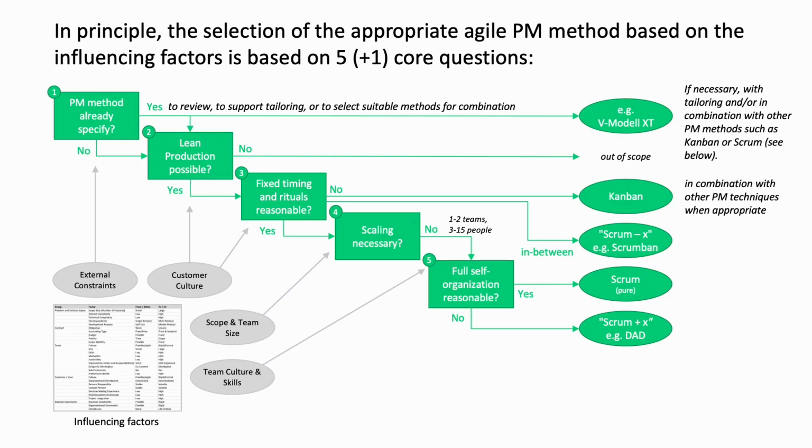And so, back to the selection process, it is to be added here first of all still that independently of whether pure Scrum or a variant with somewhat more organization is used, individual Kanban elements are often combined, in particular Kanban cards and the Kanban board. Many believe today that the board and the cards placed on it in the sense of user stories belong firmly to Scrum as a method. This is not true, but of course it does not mean that this widespread technique is bad.